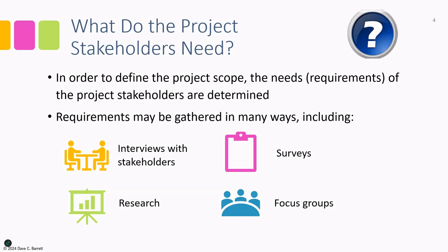When there are many stakeholders, for example, if we were trying to get our requirements from a large number of, say, customers or users of a product, perhaps a survey would be a better way to determine what the requirements are. Focus groups can be used as well.